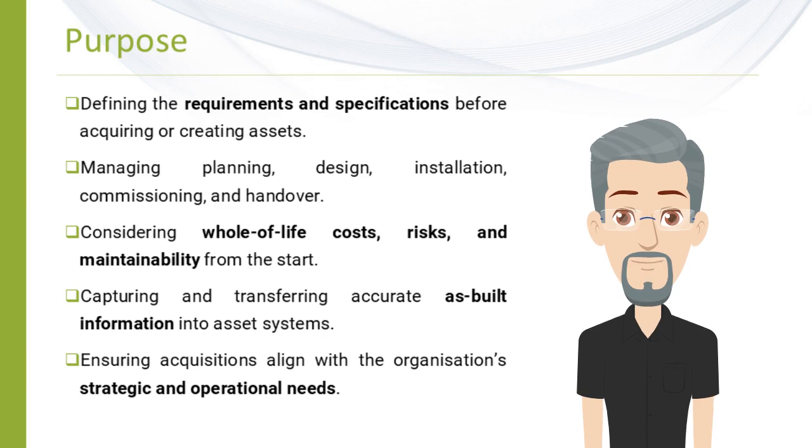We need to define what the requirements and specifications are before we even set out to obtain that capability or that asset. We need to manage the planning, design, installation, commissioning, handover, and even the whole of life considerations, at least for standing up that asset initially. The whole of life cost, risk and performance, maintainability from the onset, capturing and transferring accurate as-built information into the asset information system. That very much comes back to section 5.5, configuration management. And then, of course, ensuring that the acquisition aligns with the organization's strategic and operational needs is in parallel.